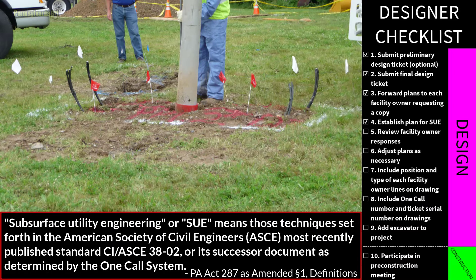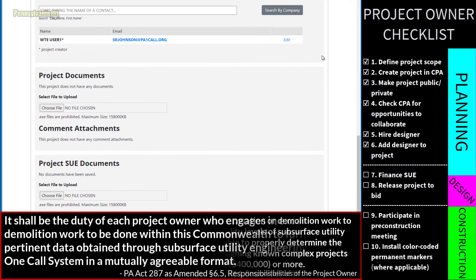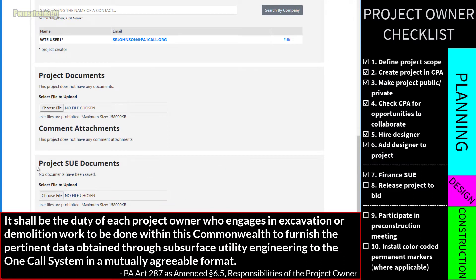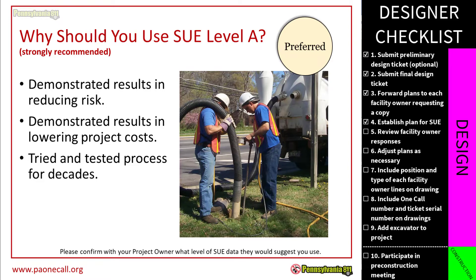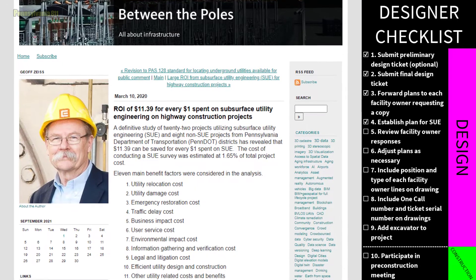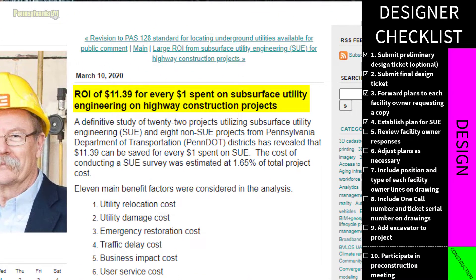When a project costs $400,000 or more, sufficient quality levels of SUE must be used. Regardless of project budget, it is the project owner's responsibility to furnish pertinent data obtained through SUE to the one call system by uploading it directly to the CPA project. A 2020 PennDOT study found that for every $1 spent on SUE, they saw a return on investment of $11.39. So regardless of the size and complexity of your project, SUE can be your best friend in controlling costs.